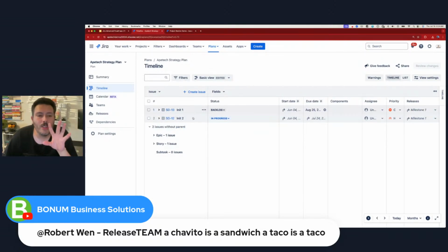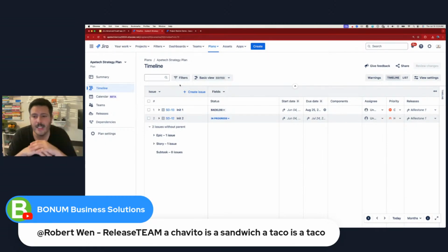Okay. So once we've figured out how to see everything, right? This next piece of information is very, very critical. So if you're taking notes, I want you to write this down. I want you to highlight. I want you to put asterisks all over it, right? Here's what you got to do, or here's what you got to know. The advanced roadmap is not directly changing Jira. What do I mean by that? That means that anything I do in my advanced roadmap doesn't immediately reflect inside of Jira.